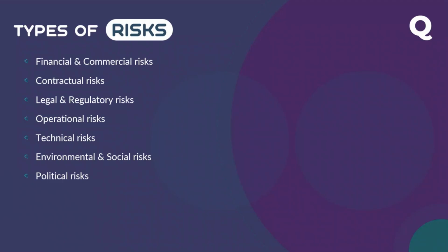Now there is third party risk. I am not sure whether I explained the privity of contract. In a contract between two parties, only these two parties can sue each other. So you have to check how third party risk has been addressed, and how any damages caused by a third party are addressed.